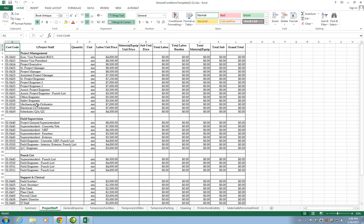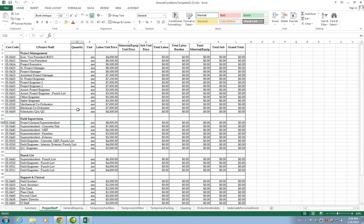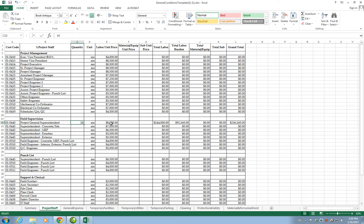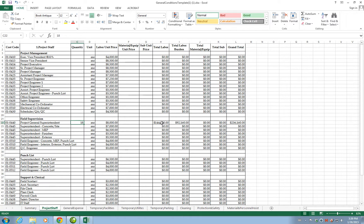If that's the case, then you will look for the project superintendent and then you will assign how many months that person is going to be working. Let's say the project is an 18-month project. You will enter 18 here and as soon as you enter 18, you will see that at a cost of $8,000 per month, the labor will be $144,000. Then, there will be a labor burden that includes the cost of sick vacations, insurance, and other additional overhead costs for the labor. That means that these 18 months of the project general superintendent will end up costing $236,160.